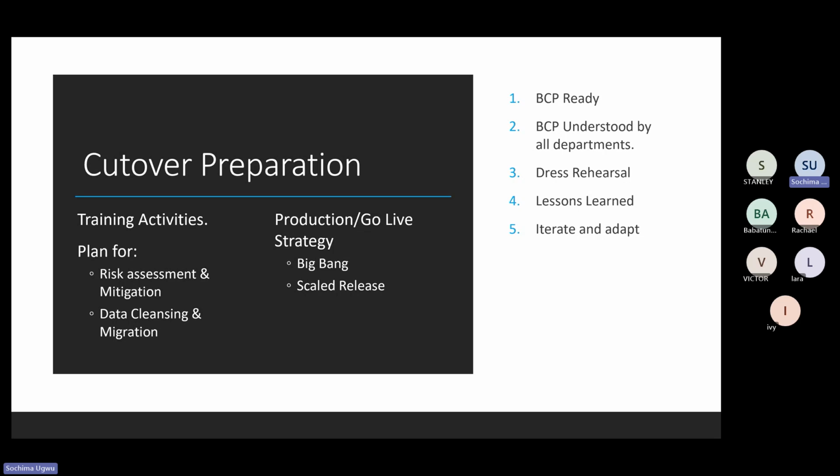A scaled release would be, you know what, at 12 o'clock we are going to release the modules that control sales, and we'll see how that module works for maybe the next 6 hours, making sure everything is okay. Then we deploy finance and monitor it for another 6 hours. Then we deploy procurement, warehousing and HR, and once those are working in the next 3 to 4 hours, we deploy the multi-vendor application and the postal management software. So these things will come into the plan.